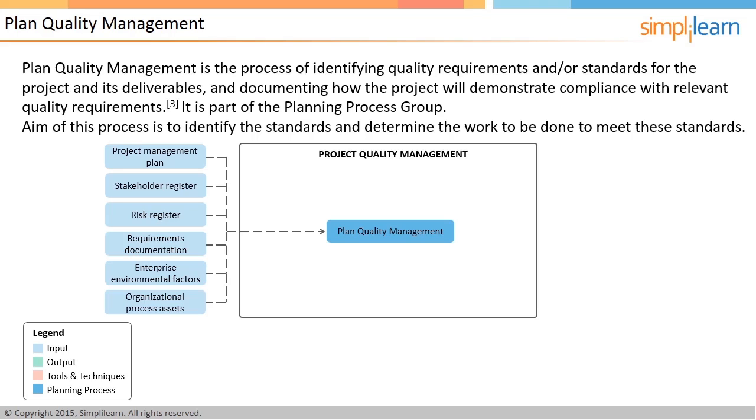An example of government standards can be standards to control air pollution by the motor vehicles, which vehicle manufacturers must adhere to. To accomplish quality planning, first, analyze the benefits versus the costs of meeting quality requirements. Next, identify the cost of quality and confirm if that kind of investment in quality is justified. In addition to these 2, benchmarking helps in analyzing the quality of activities of similar projects executed in the past. This helps in identifying the particular quality of output of the previous project, which in turn acts as a basis for the current project's quality planning.